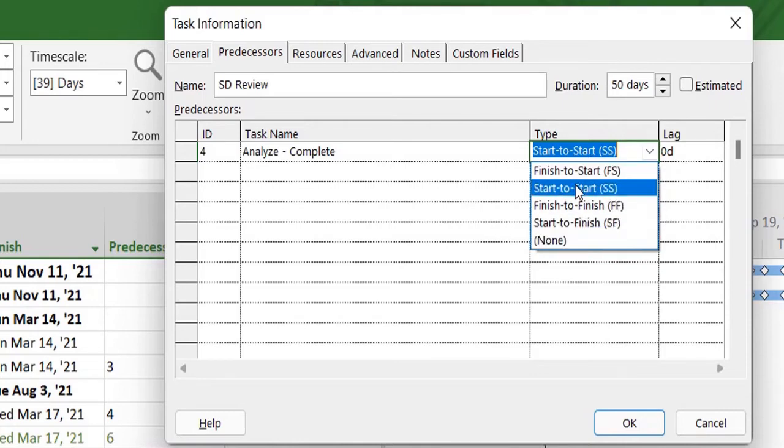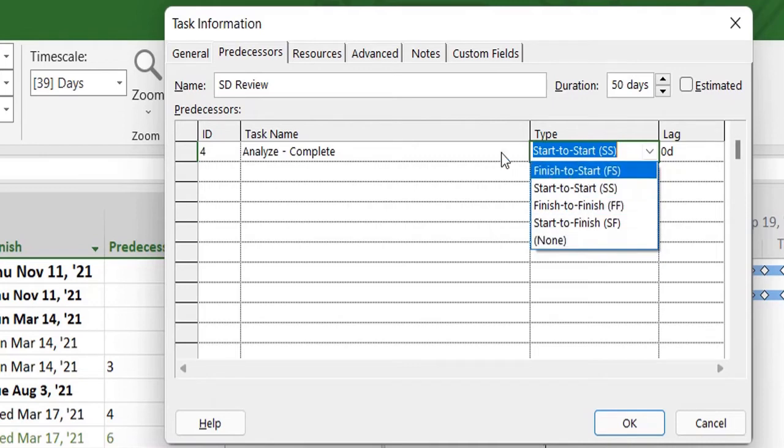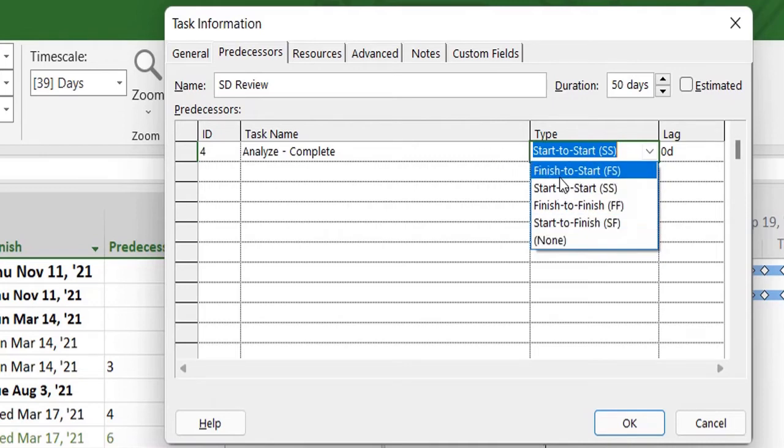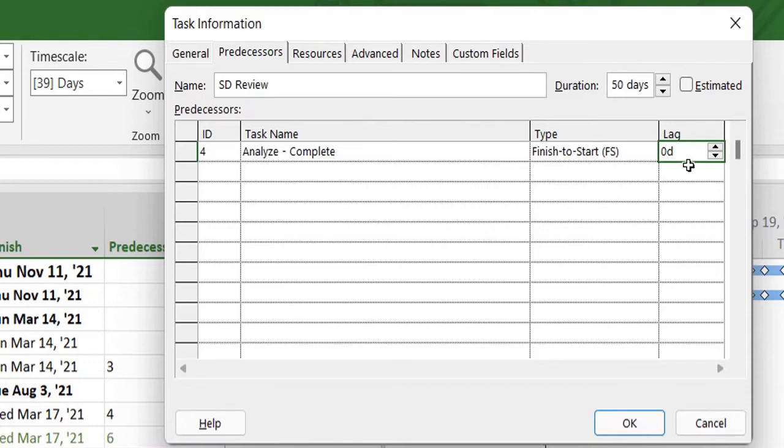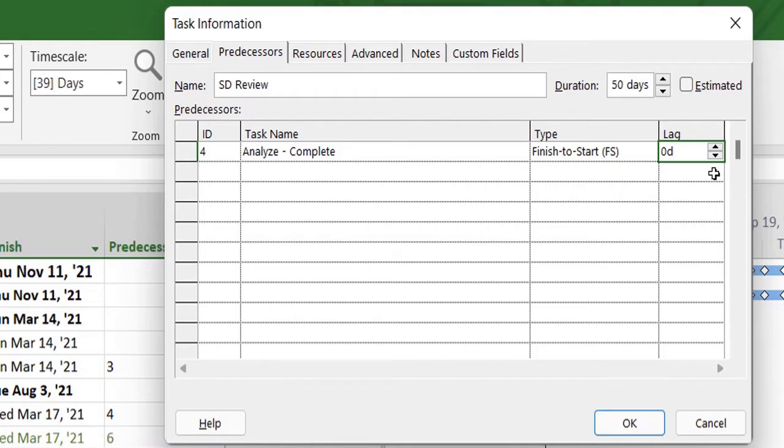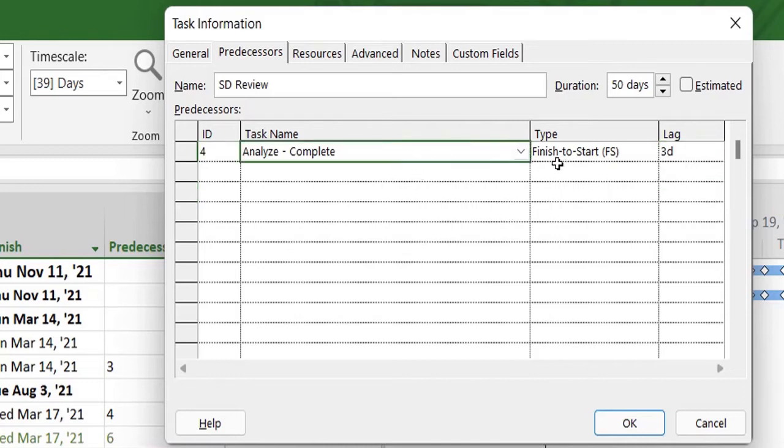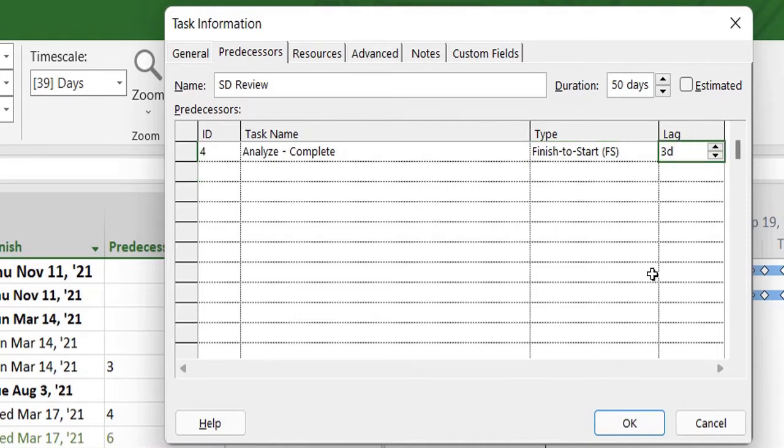These are the default types that are available for a relationship. The last field or parameter is lag. Lag allows you to create a gap between two tasks. For example, by default it's zero days. Number 8 will immediately start after task number 4. However, if I want to give it a 3-day gap between 4 and 8, it will allow you to start task number 8 three days after task number 4.